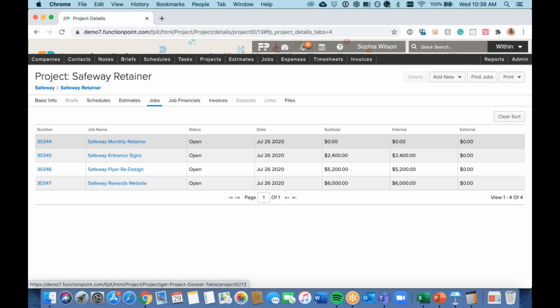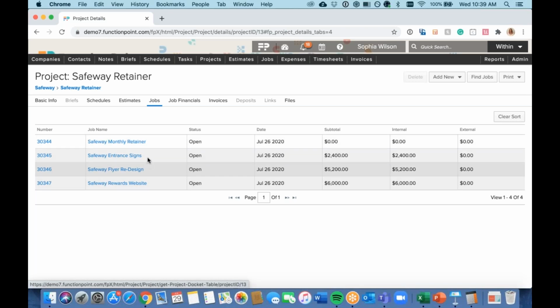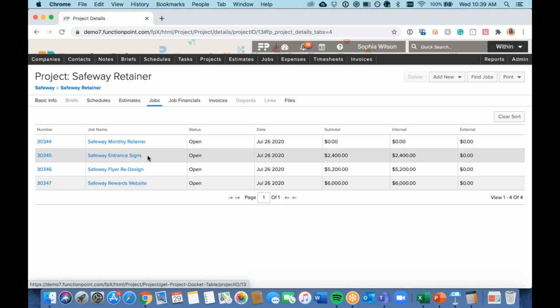And this is where you're going to define those number of hours that are associated with that retainer. This is going to be the job that you are going to quote unquote bill for every single month. However, it's going to be these 3 jobs underneath it that are completely different deliverables that you could be working on. It could be specifically for that month. It could actually even expand over multiple months. But really what our goal is, is to track the number of hours against those jobs so that we can see where that profitability is that feeds into what you're billing for retainers.